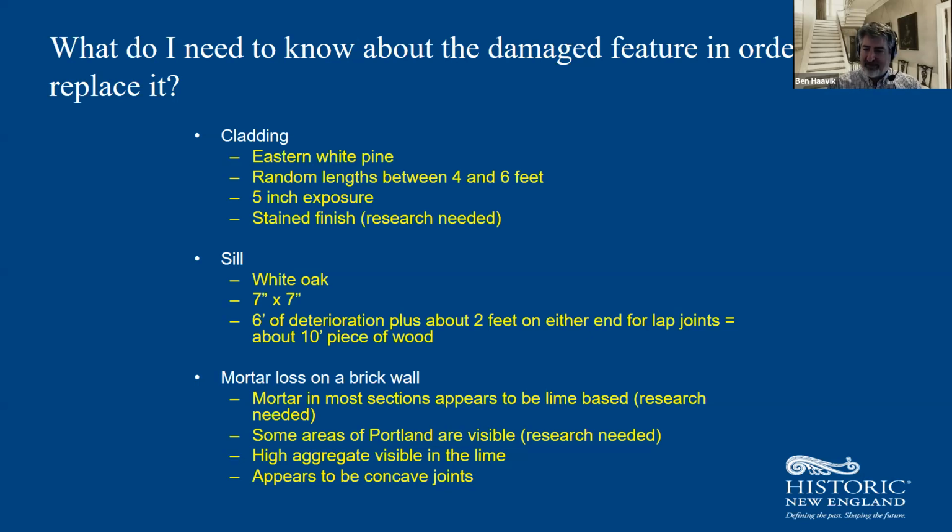Mortar loss, it's all the kind of same questions. Again, this is highly technical details. The regular homeowner is not going to be able to provide these details, but it's good to understand what goes into a good project plan, because this is what you need to give to that contractor ultimately and say, you're going to need a 10-foot piece of wood.